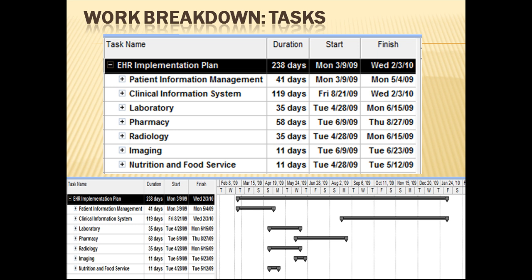The project must begin with the configuration of patient information management. When this is completed, laboratory, radiology, and nutrition and food service can begin. When these are configured, pharmacy and imaging can begin. The last thing implemented is the clinical information system because it is dependent on the configuration of all of the other tasks.